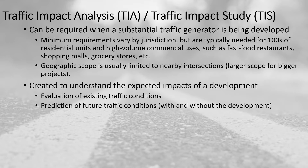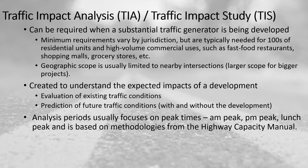Then we look at the prediction of future traffic conditions. Part of that is looking at the background traffic volume — what would it be without the development — and then we also layer on top of that what the impact of the development will be on those traffic conditions.